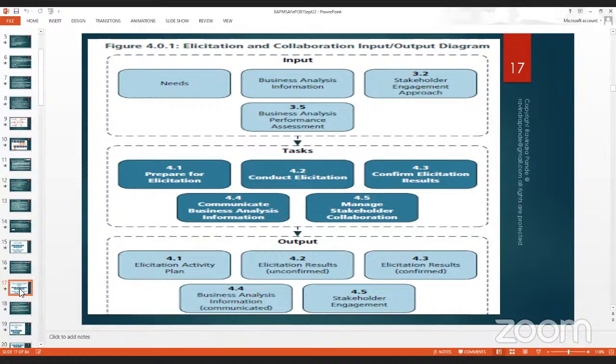As the product owner is the ultimate sanctioning authority, we treat that as the final, approved requirement, and it gets included in our list with the date, time, second, and day of the week as a timestamp in the RTM, saying Mr. Product Owner approved this requirement on 8th September at 10:30 p.m. while we were discussing at so and so place, and he said let's go ahead with this color, which is sanctioned and approved by him. And whenever you send this document to him, he also concurs in writing via email, saying yes, we discussed and this is what is approved. That's why we need to manage stakeholder collaboration in terms of who is the senior-most authority, who has a say in our requirement gathering process.